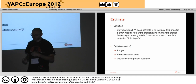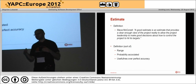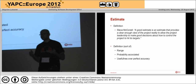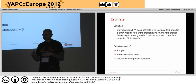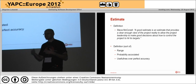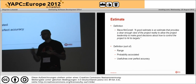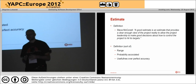When you make an estimation, it's good to make a range from worst case to best case, so the project manager has more information than just one number. An estimation is always associated with probability - it's never 100% certain. Sometimes it's not really useful to make a very exact estimation because it would take too much time, so you need to make a trade-off between usefulness and accuracy.